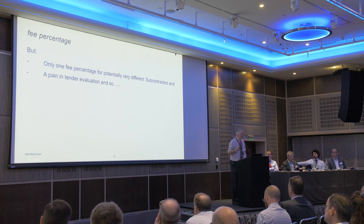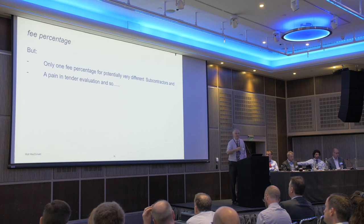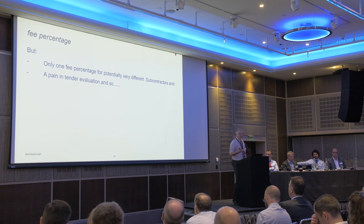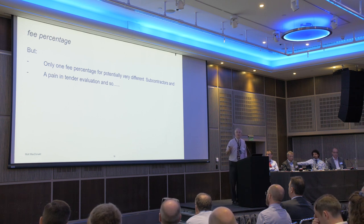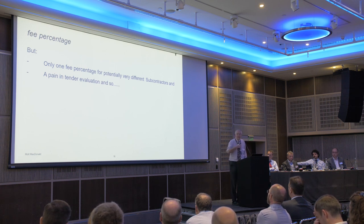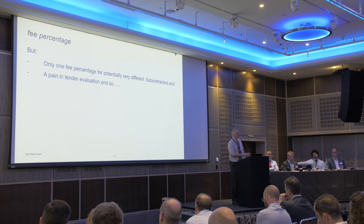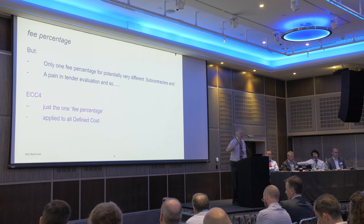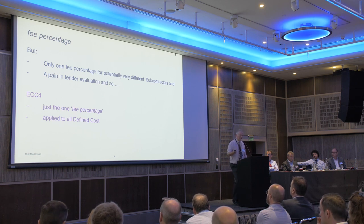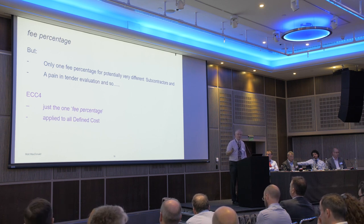Even in ECC3 there's only one subcontractor fee percentage, and the contractor might have liked different percentages for different subbies. Doing tender evaluation on this is a pain — you have to make a wild stab at how much will go through to subcontractors versus the main contractor, which is a leading reason why ECC4 made it easy: single fee percentage applied to all defined costs.